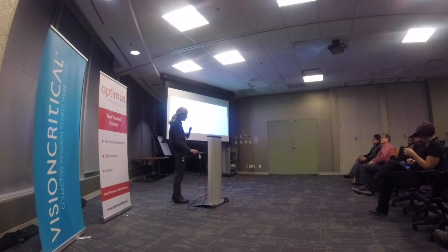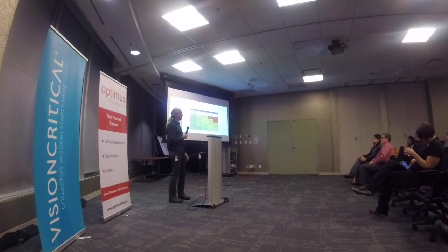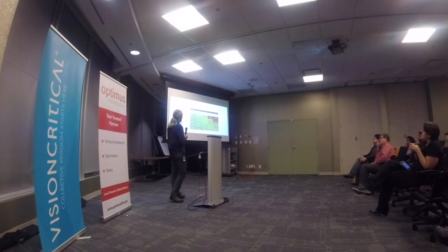So once you've done all that, as I said, you're then going to try and assess, based on what you now understand of the risk areas, what's the likelihood of it happening, and what's the impact of it this time. So along the top, the x-axis, if you like, is the impact. So anything from negligible, in which case we don't really care, to some minor thing, and maybe it's a bit worse than that. So it's a moderate impact, significant impact. Someone can't do something they really want to do, but they can still do other things. And it's severe. It's like, okay, I can't do critically what the product is meant to provide for me in terms of value. I can't do that thing.